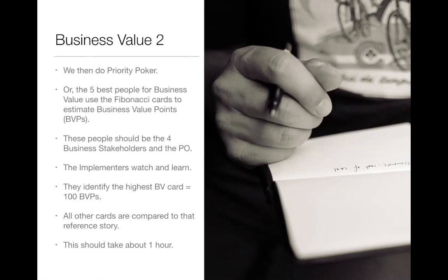So we compare all the cards to the reference story, and then all that voting and learning should take about an hour. 50 stories, 60 minutes, maybe 75 minutes if they need to go a little bit slower.